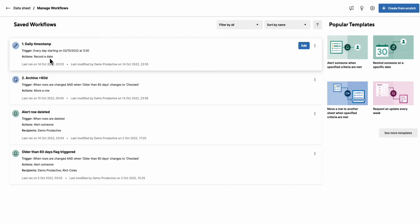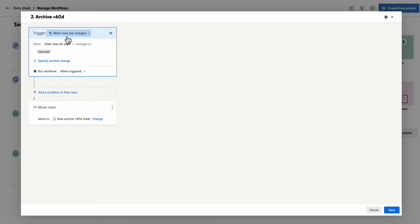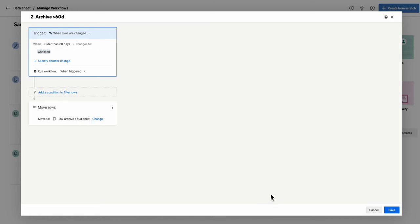Let's go back to that one. So the second automation is when the rows are changed and older than 60 days changes to checked, then it moves the rows to an archive sheet.